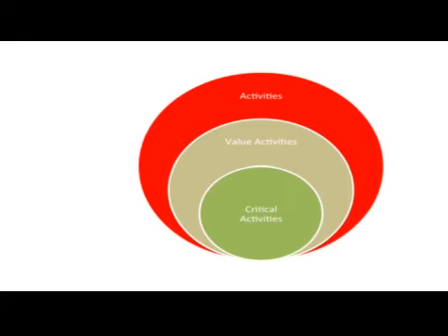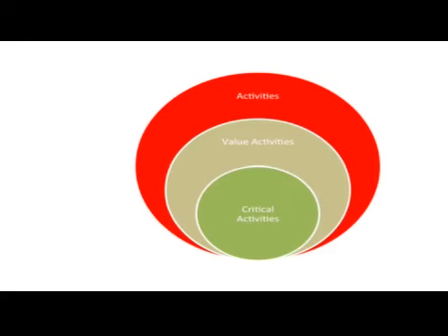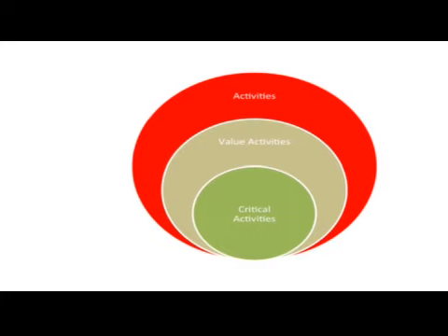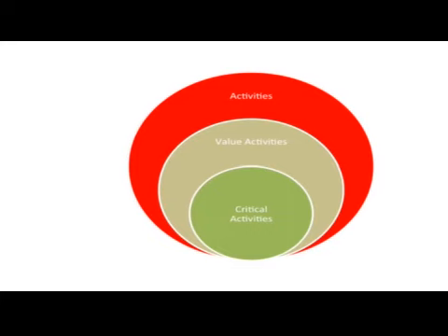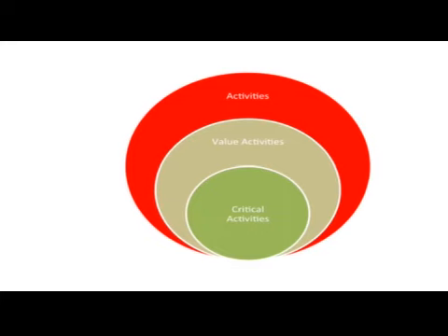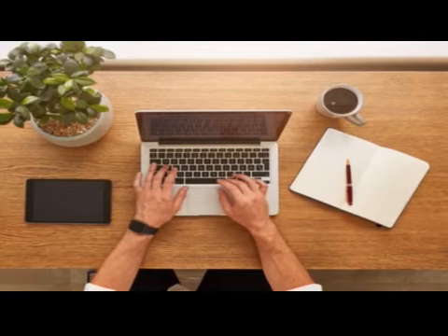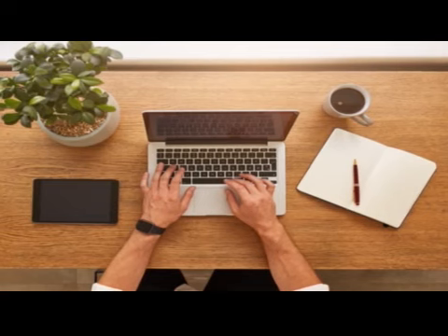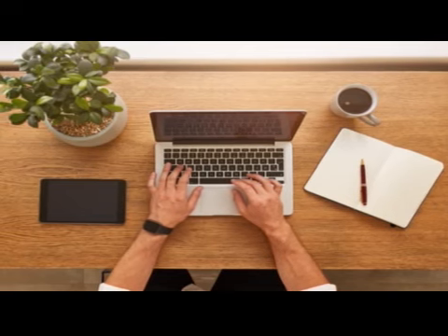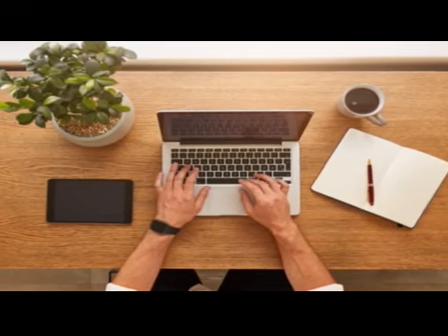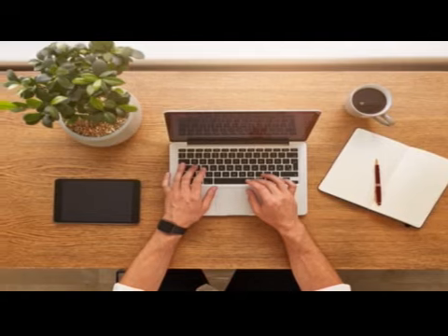In all of these techniques, the job is divided into various activities or sub-activities. From these activities, the critical activities are identified. More importance is given to the completion of these critical activities. So, by controlling the time of the critical activity, the total time and cost of the jobs are minimized.